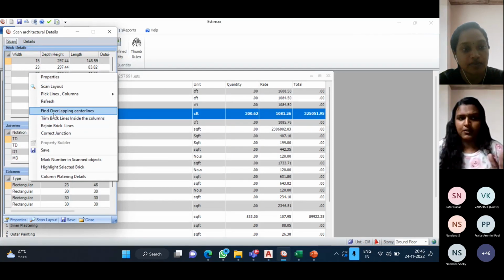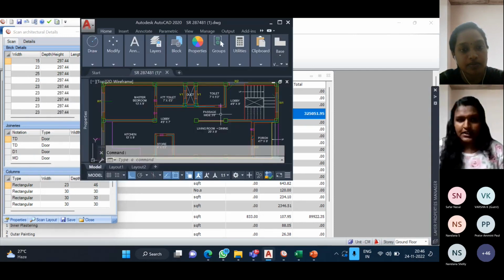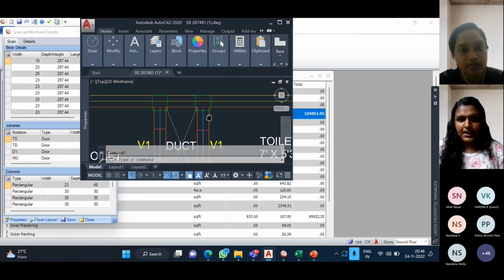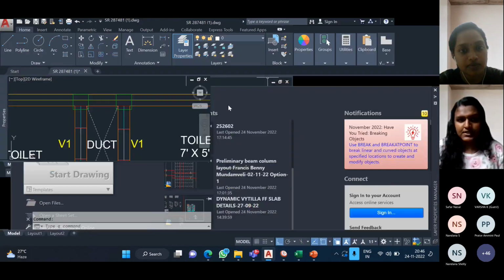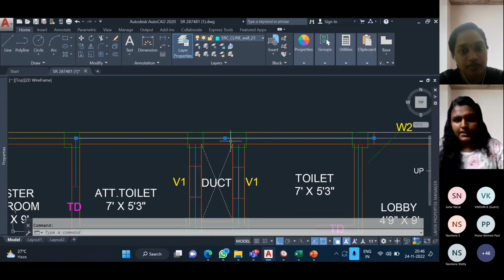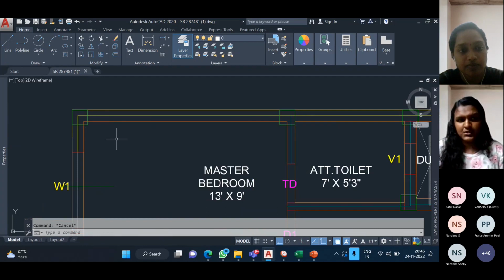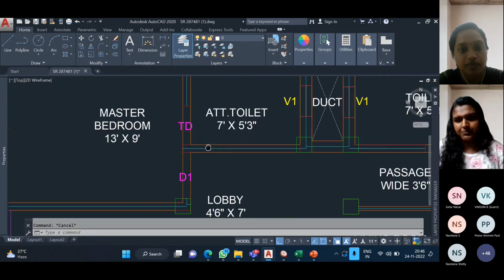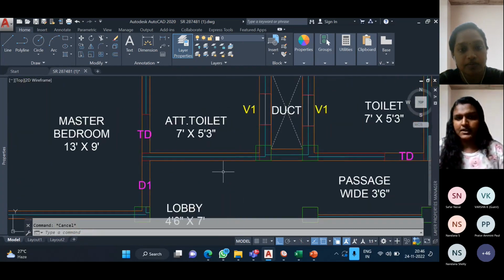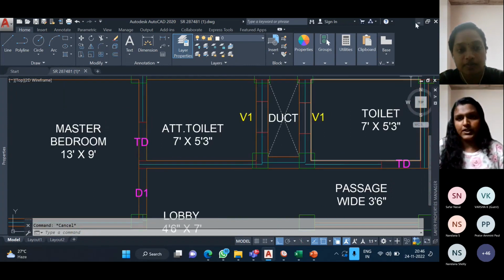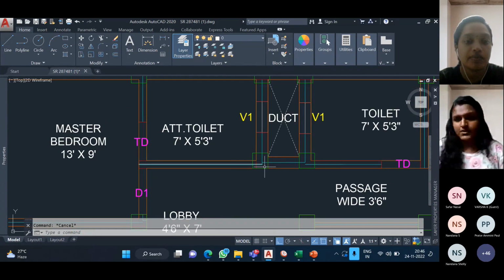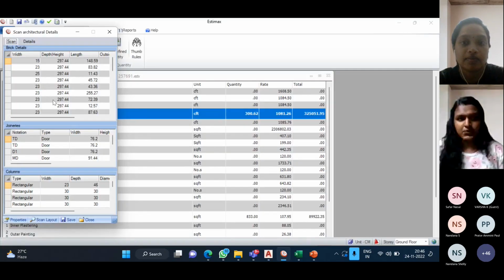The basic reason why we are providing these corrections is that in the drawing we can see the central line is generated right now, and the central line is passing through these columns. There should be a correction for the junction here. Manually, we know that there is a junction correction in the estimation process. So in order to trim out those central lines, we have to do these four corrections.